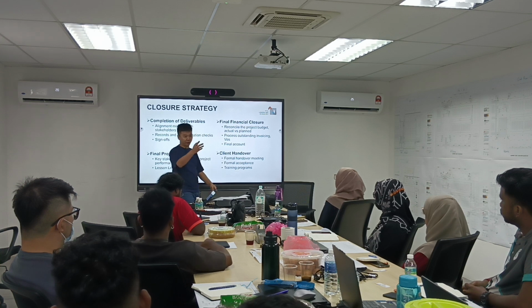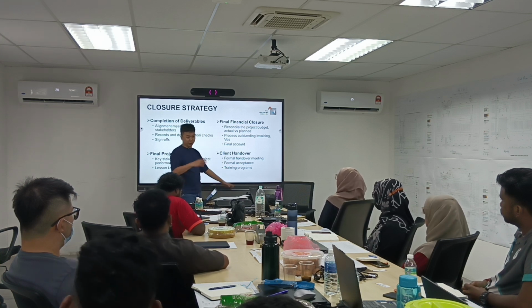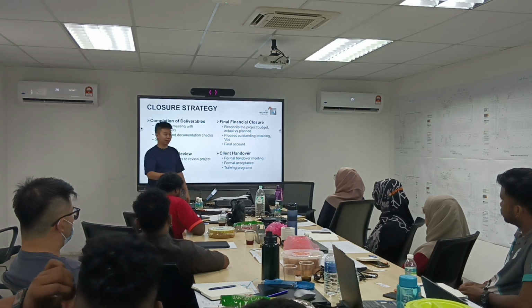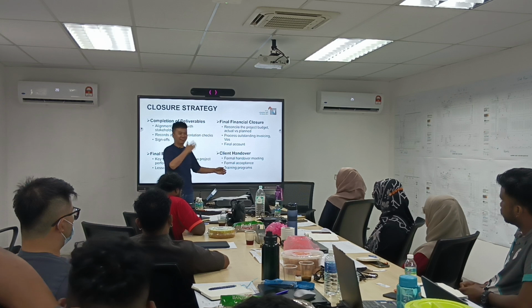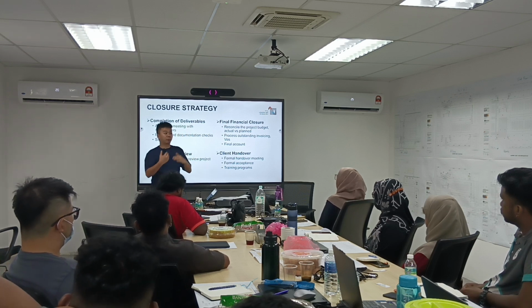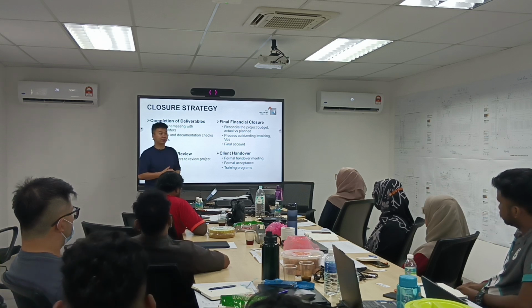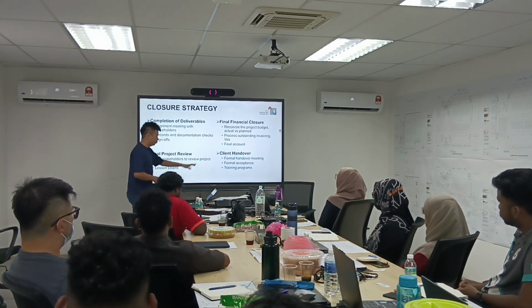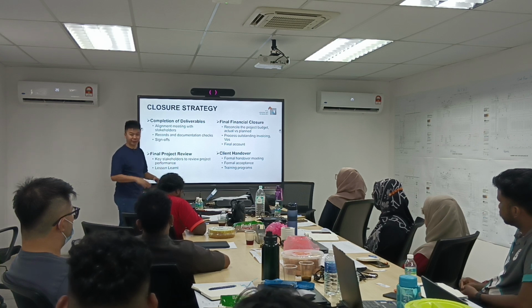So training programs, okay, last round was very messy. Not to say that we only limit them to training for one round lah. So suppose we have a training program to make sure the client side is able to pick up all the system. Although we are demobbing, we still need to make sure they can operate the system lah. That's part of our responsibility. So we should give them a training program as well. Means down the road, maybe 6 months later, I come back and see which of your guys cannot, a bit loose, I tell you what to do, something like that.